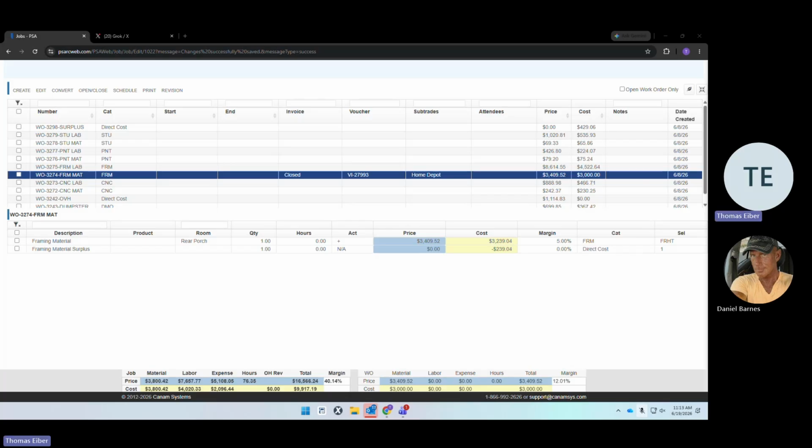All right, so SCAs versus POs. So an SCA is a subcontractor agreement. And this has to do with vouchers, so we're still on the same subject. So you've got two acronyms here. You've got an SCA, which is, again, a subcontractor agreement. The SCA is an agreement between us and our subcontractor that says, hey, you're going to do all the items listed on this work order, which is just the description that we add when we're sending this document over.